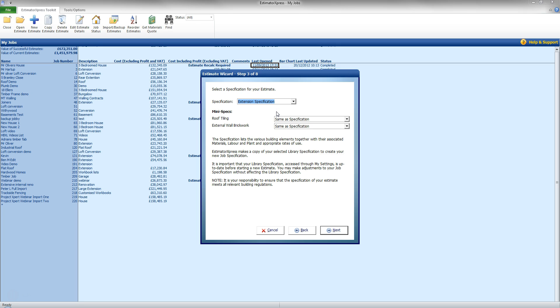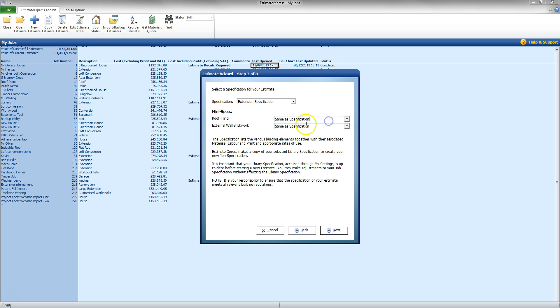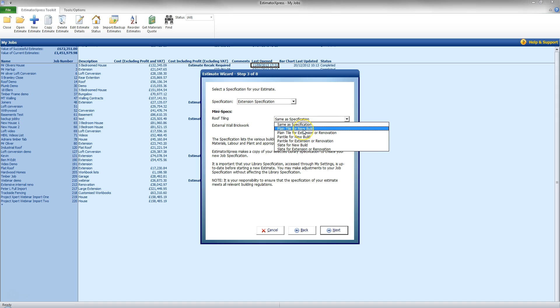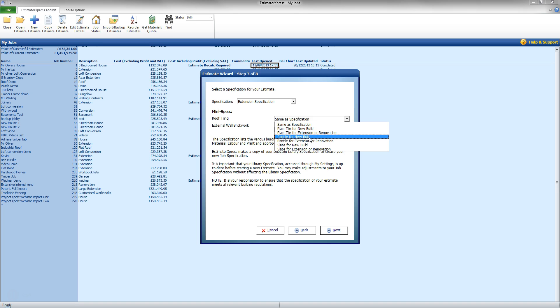Now I also have a few extra options at this point in the form of the mini specs here, the mini specifications. Now I can see I have a roof tiling specification here so I can go either same as specification, so what is default, or I can go to the drop down list and select for this job I can go for a plain tile for new build or plain tile for extension and renovation which actually extend the labour time for that task.